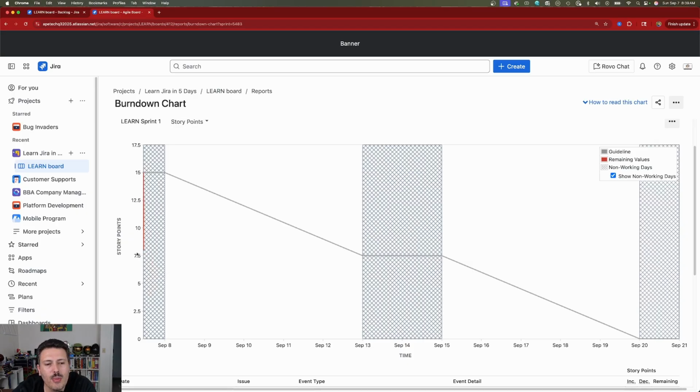So when you start your sprint, Jira is going to establish a baseline. It's going to tell you, okay, we have this many points. That's where we're starting off. And your idea is to burn down. You've got to start at the top, whatever number you have with the total number of story points. And then as you move work to done, you only get credit when the item moves all the way to the far right column. But as it moves to done, then this item will move down and the red line goes down as you finish those points.